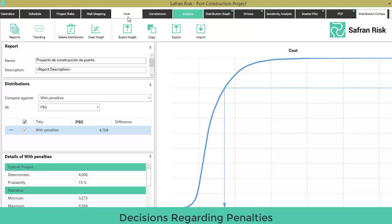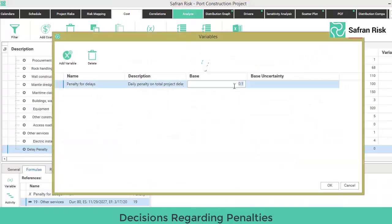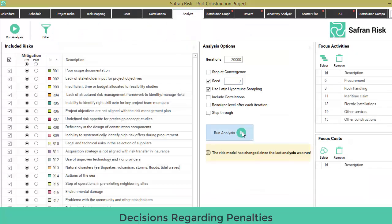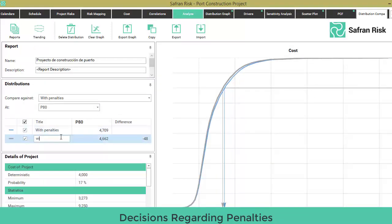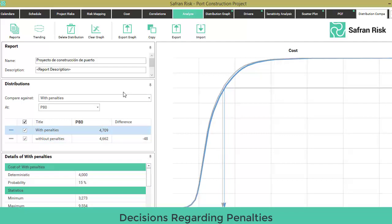Go back to the Cost tab and temporarily modify the penalty variable to a base of zero. Click OK. Go to the Analyze tab and run the analysis again. Located again on the total project cost distribution graph, now send to comparison. The added comparable curve may be renamed to 'without penalties'. The dialog box displays both P80s, P50s, and means. By choosing P80, where this company has decided to make its decisions, you will see a $49 million difference — a P80 of $4.66 billion without penalties, which increases to $4.71 billion with penalties.